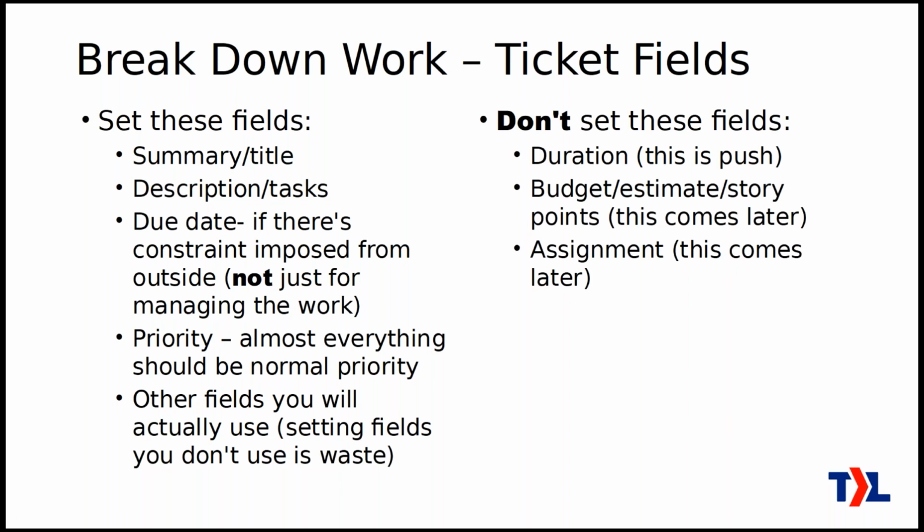There's a couple of things that you're not going to set. You're not going to set the duration, because that's kind of a push thing. It tells the engineers what period of time they can work on this in, and that's like pushing the work instead of letting the engineers pull the work, which is more agile, more of a Kanban method. So we're not going to do that. Also, we're not going to set the budget, estimate, story points, things like that, because we're going to do that later, and we're not going to assign it to anybody just yet, because that will come later as well.